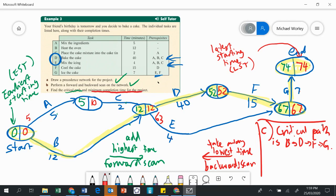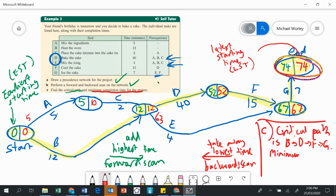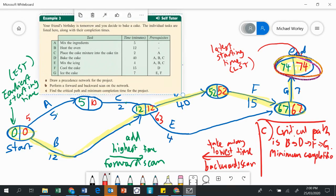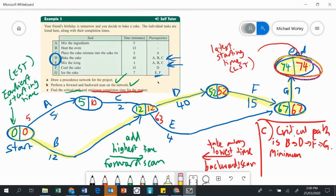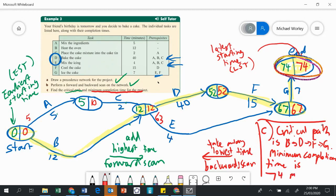The minimum completion time for the project is the number in the bubble at the very end. The minimum completion time in this case is 74 minutes. That's how we do a forward scan, a backward scan, how we find the critical path and how we find the minimum completion time for the project.